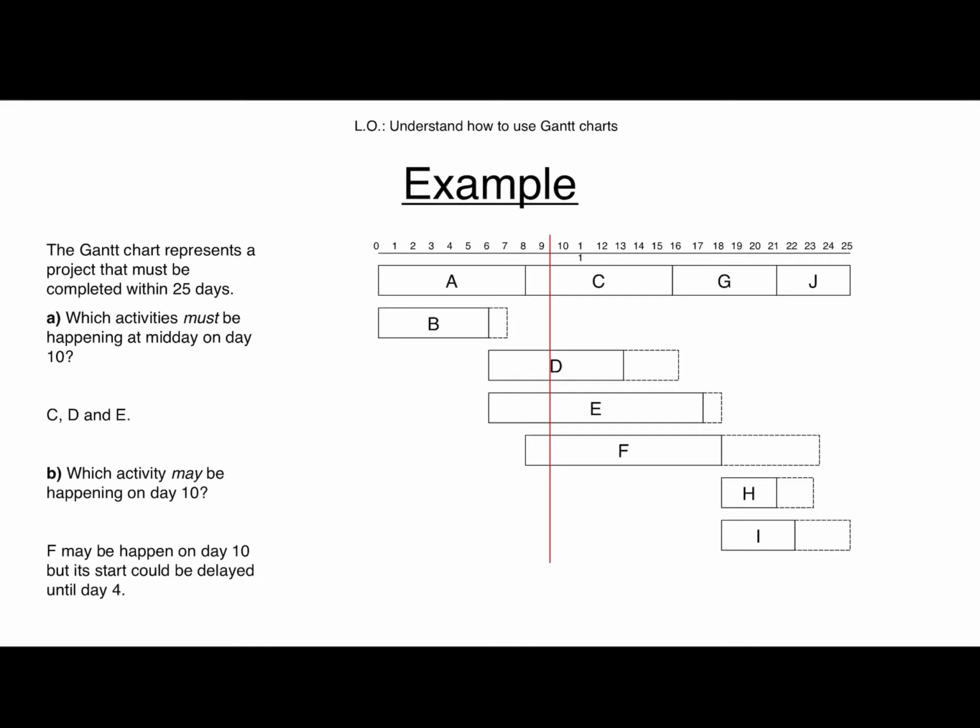So I would need one person to do the critical activities, a second person to do B, D, H, and I, a third person to do E. I may need a fourth person to do F. Something like that, 3 or 4.